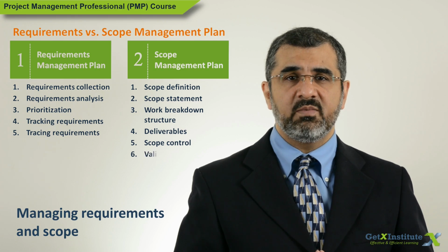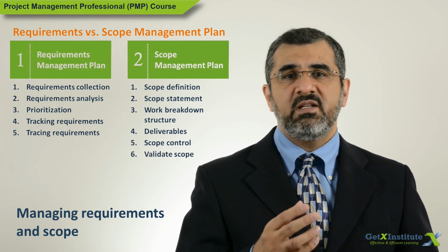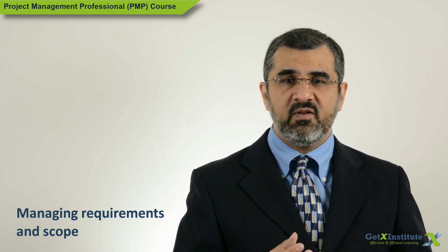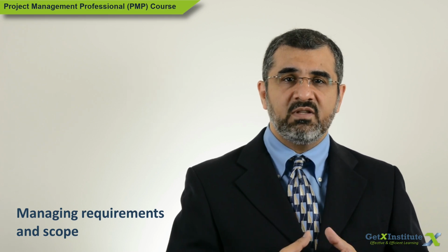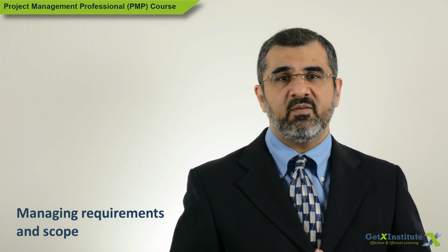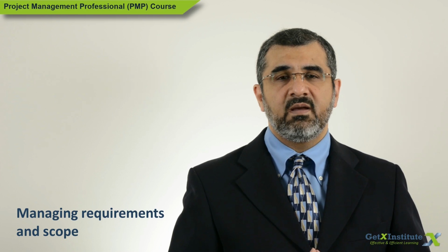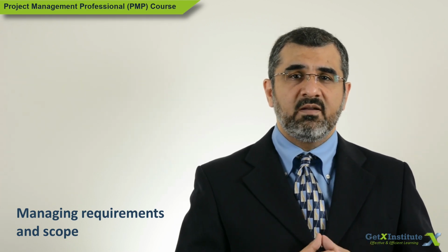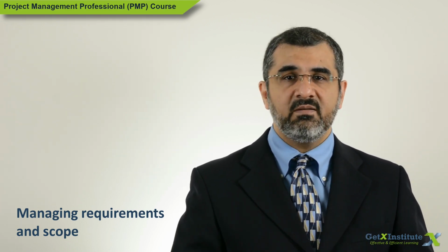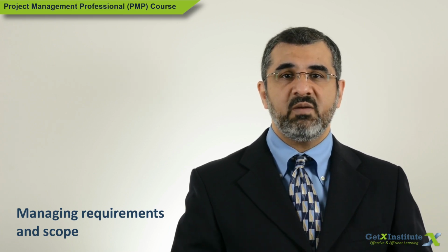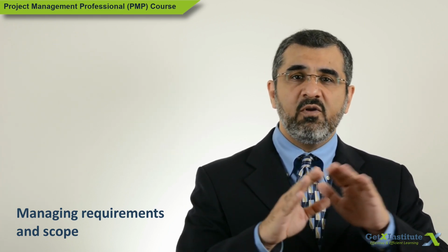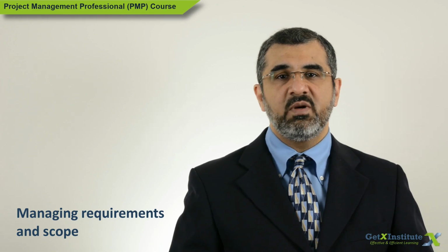Then validate scope. Who will accept the deliverables? What will be the method of asking for the formal acceptance of deliverables? Right, so together the scope management plan and the requirements management plan will cover the full spectrum of project scope management work.